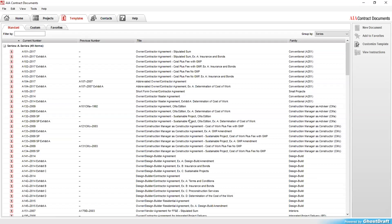If you do purchase the AIA contract package you have access to all of these. An annual subscription for the AIA contract documents runs about $1,200, and depending on how many forms you may be using throughout the year, that may or may not be worth it.